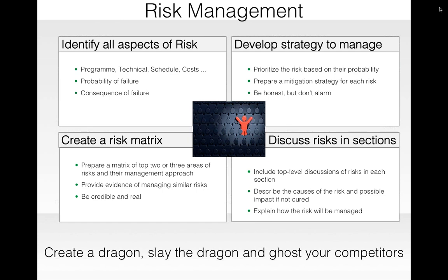So you need to identify all the aspects of the risks, whether they are related to program, technology, commercials, contract. You need to identify the probability of the risk, like how probable is it that this risk is going to come up or shape up, and what is going to be the consequence of the failure, and what will be the cost of that failure.